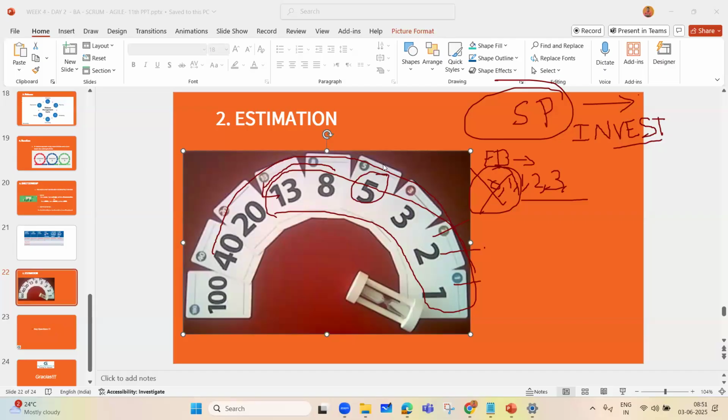Totally, we have gotten 5 story points, right? So if this is the baseline, depending upon this you will define the story pointing for the next user story. So this is how you are going to define the story point for every user story. Now, this is very crucial. User story 1 will have 5 story points, user story 2 will have 13 story points, and user story 3 may again have 3 story points, and so on.